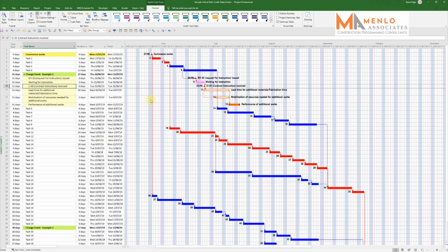So the resources you have on site, the excavators or whatever, currently on site, are 100% committed to carrying out the works under contract. So any additional work requires additional resources, and you can't immediately ring up and say I want a 20-ton digger here in the next 10 minutes.